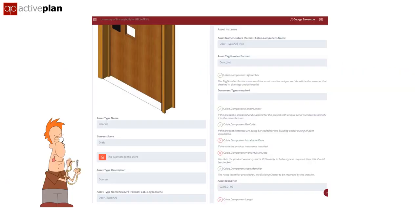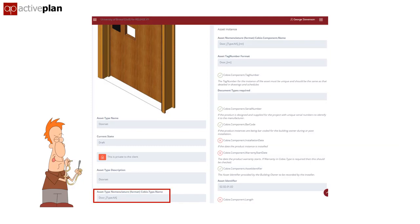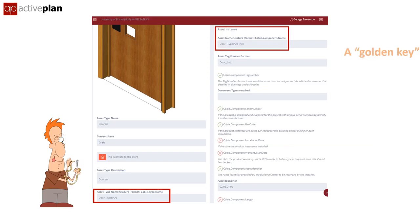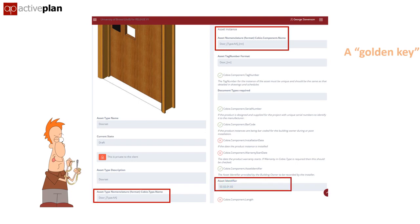To tie things together, the AIR creates a reference code that acts as a key that automatically connects databases with objects in the model — a golden key for the golden thread — and this can include the code the FMs use in their CAFM systems.